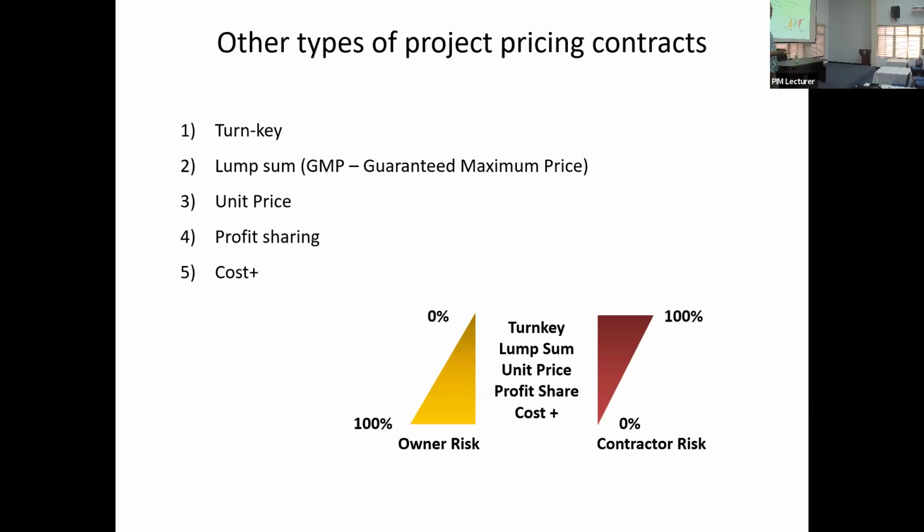Now, what will the contractor do? Will he look for the lowest cost or the highest cost? Highest cost. He will always look for the highest cost. Why? His 10% is more then. He is not going to look for the lowest cost and give it. He will want to put the invoice maximum. Then his 10% is also high. So the risk for him is very low.